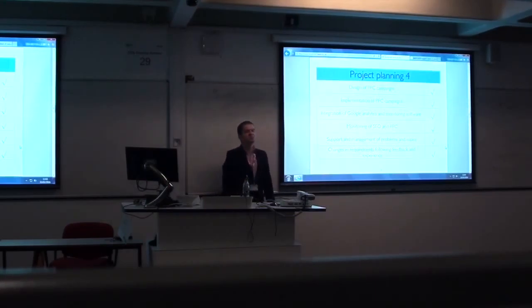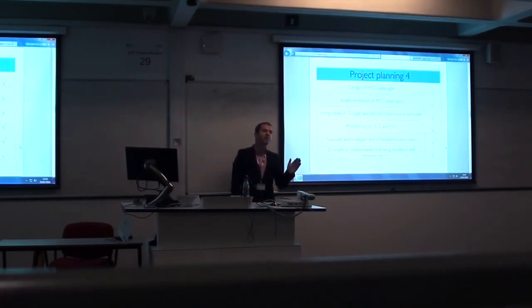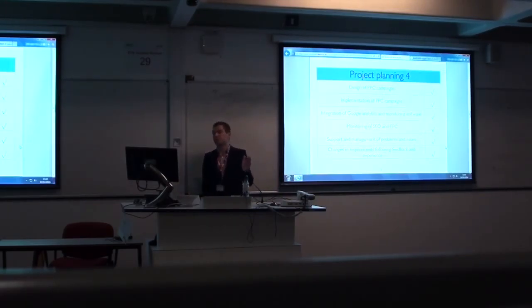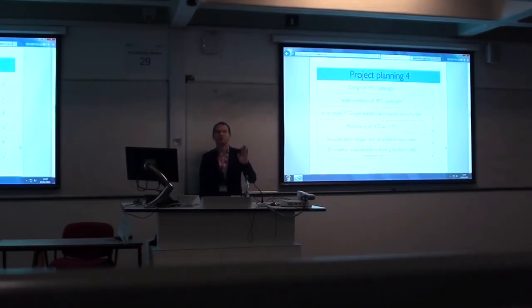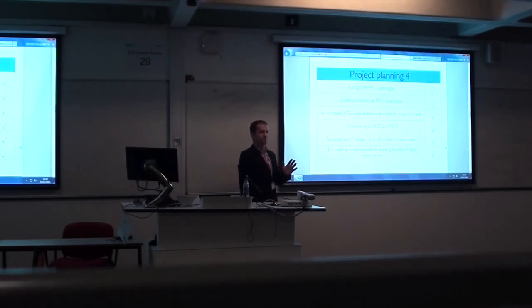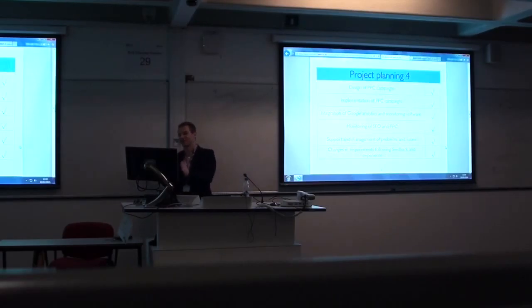Support and management of problems and issues. How would you deal with that? What would be your process put in place? Again, one way of avoiding that is by having clear milestones and sign-offs on every stage of the project. Which means that once you've had people agree on wireframes and what needs to go on those first pages of the website, including the functionality, there's no way back. That's been decided, we have to move to the next thing.